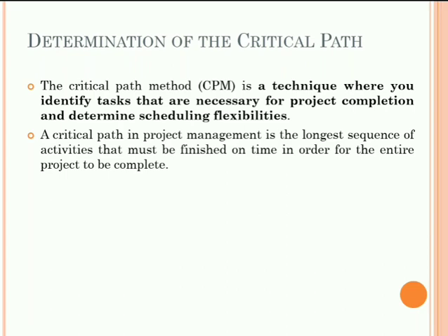Okay, let us consider the second activity. The start time of the second activity is the end time of the first activity. When we finish the first activity, then and only then can we start the next activity. And the end time is the start time plus the duration that is needed for completing the second activity. We will do this for all the activities, as we have done for the first, second, third, fourth. Whatever the number of activities, we can apply this for each and every activity and we can calculate the actual time.